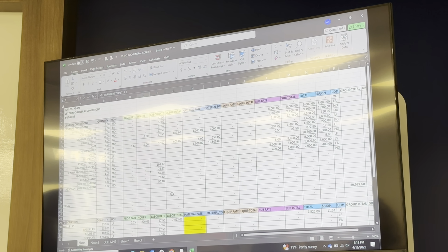So this is equal to 0.7 times 40 times 4.33, so the target is 121 hours.